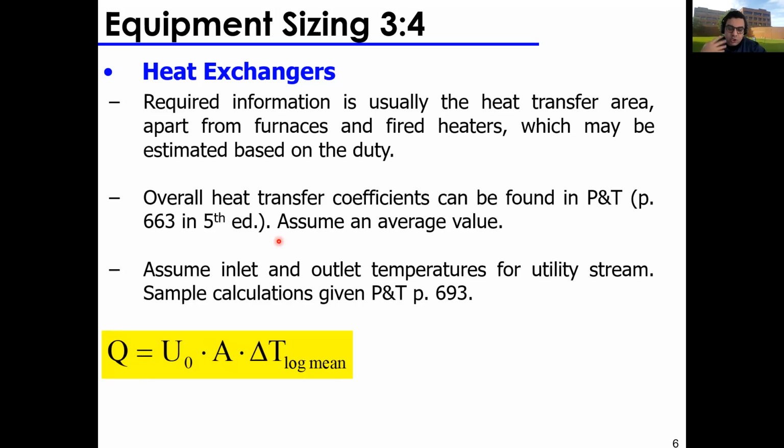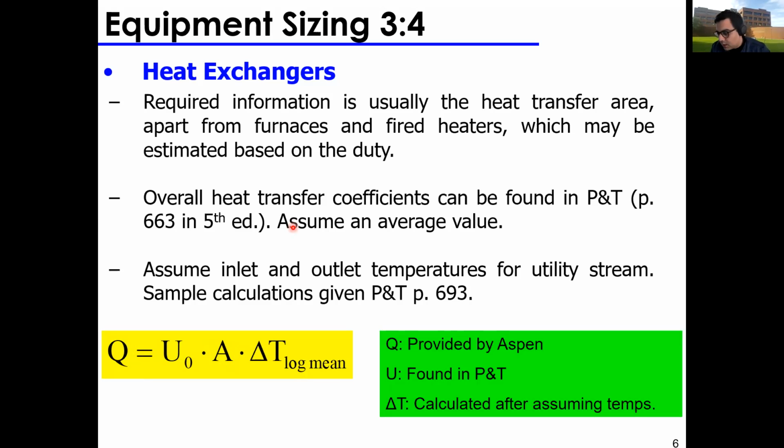There's a Chemical Engineering magazine, which every month or every couple of months publishes the chemical engineering pricing index. And you can always look up these costs using these parameters to size your plant, okay? And they're based on economic factors, on the price of oil, price of commodities, all this stuff.